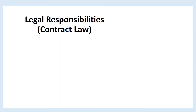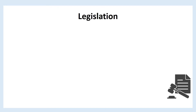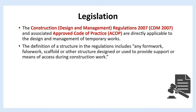Regarding legal responsibilities and contract law: the main contractor cannot subcontract responsibility for safety. The Construction, Design and Management Regulations 2007 (CDM 2007) and the Associated Approved Code of Practice (ACoP) are directly applicable to the design and management of temporary works. The definition of a structure in the regulations includes any formwork, falsework, scaffold or other structure designed or used to provide support or means of access during construction work.